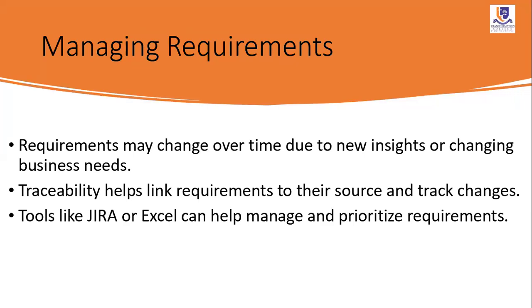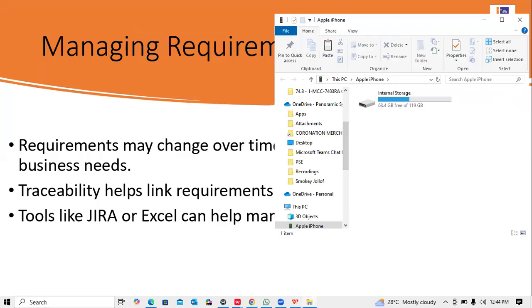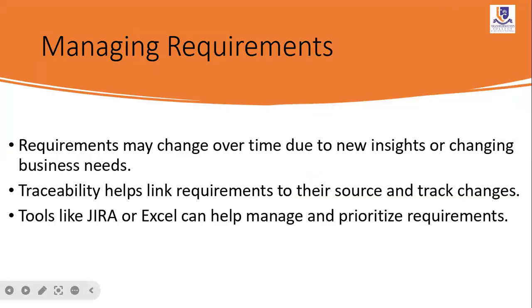They said what they wanted out of the software. This was somebody we had been on good terms with, so some of the documentation and some of the approach was not captured. In the long run, they started changing what was said initially, which was not properly documented.